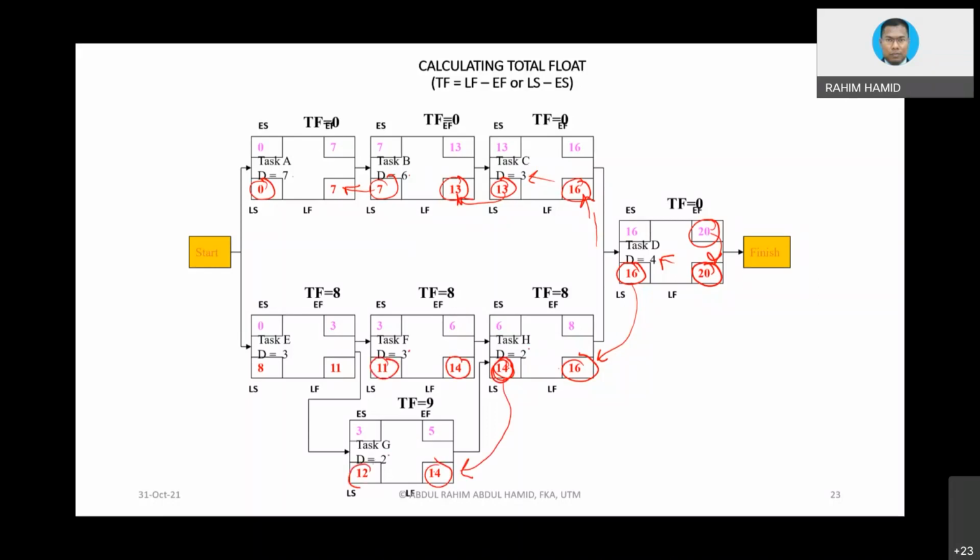Okay, then when you go back to this value here, now you have to decide which one is the least value, the smallest value for backward pass, similar to arrow diagram. Okay, so the 11 will be chosen to be here. 11 minus 3 equivalent to 8. Okay, remember we start with 0. 0 plus 0 equivalent to 0. And at the end of the day, you see this 0 is here. This is 0 that go back to the starting point. 0 minus 0 is basically we go back to 0.